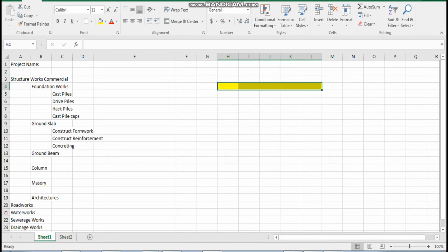If I say the project is supposed to be finished in 18 months, basically you've already done all this analysis here, produce everything, and then you're going to see that you need 18 months from the beginning to the end of the whole project. It's 18 months, and if you put that in the contract, you're actually in effect committing it legally to the client that the project will be finished in 18 months, meaning that the client will have the facilities that he needs to have in 18 months, and it is a legal implication. If you delay, there is penalty in a contract, okay?